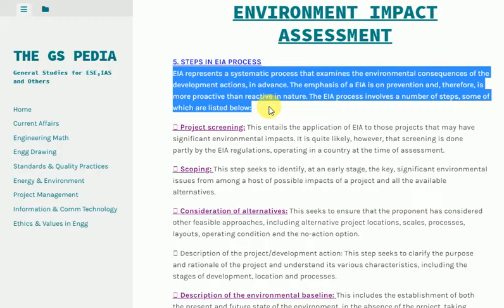The EIA process involves a number of steps. Project Screening: This entails the application of EIA to those projects that may have significant environmental impacts. Screening is done partly by the EIA regulations operating in a country at the time of assessment.